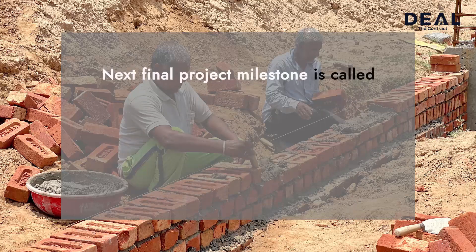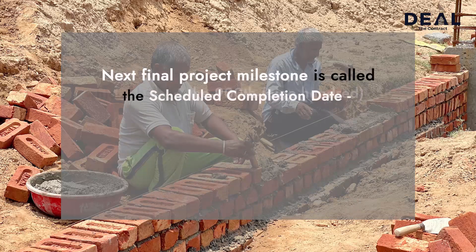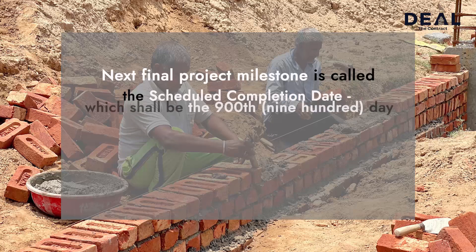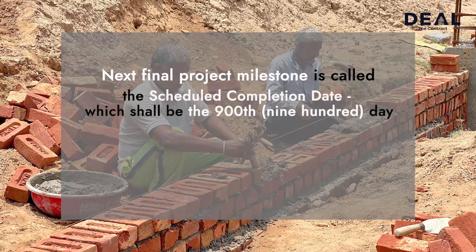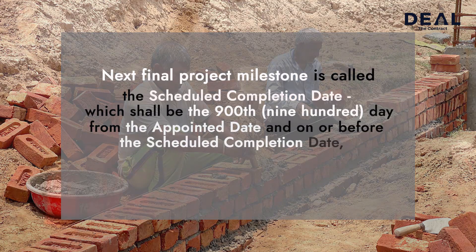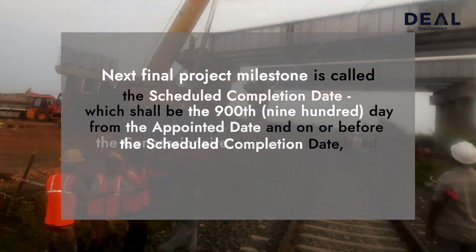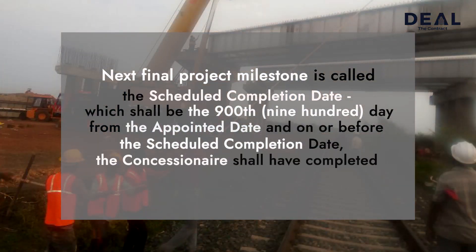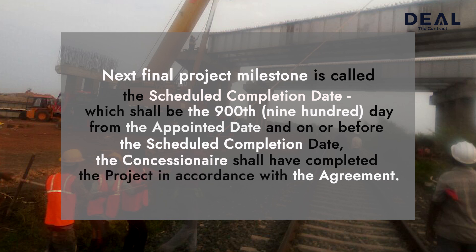The final project milestone is called the Scheduled Completion Date, which shall be the 900th day from the appointed date. On or before the Scheduled Completion Date, the concessionaire shall have completed the project in accordance with the agreement.